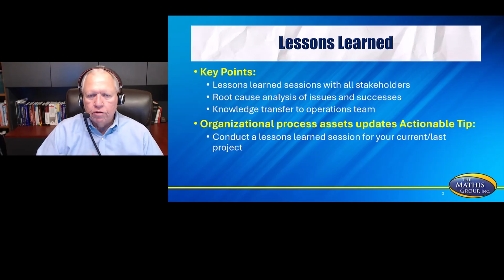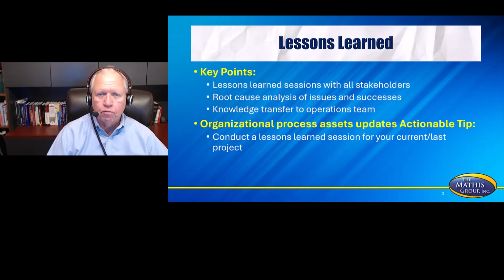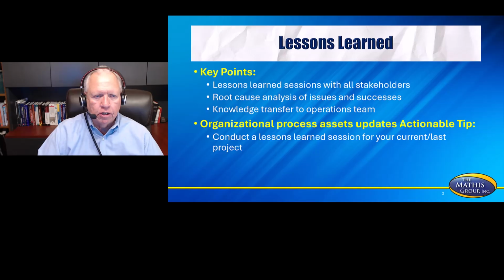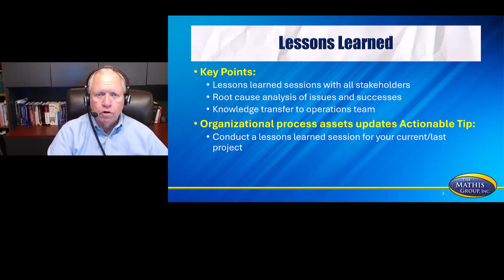Key points about the lessons learned sessions: all the stakeholders attend. You're going to have root cause analysis of issues and successes that come up. You're going to look at knowledge transfer to the operations team or to the customer. And then organizational process asset updates would include actionable tips such as conducting a lessons learned session for your current and last project. Lessons learned and the word retrospective are really the same. Lessons learned is typically used more on your traditional plan-driven or waterfall project, and retrospective will typically be used more on your agile or scrum project.